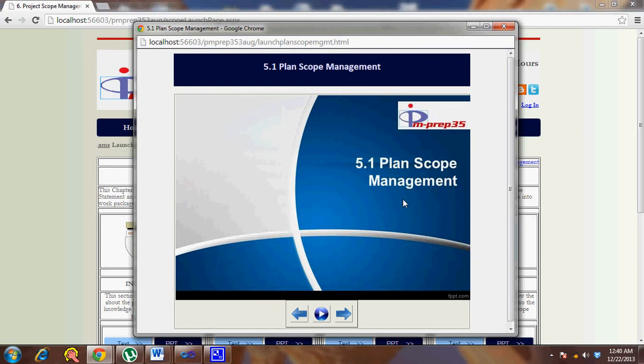That's where your project charter is really vital. Your project management plan will tell you how you will detail scope or the different subsidiary plans, but the project charter has more specific details about what is required, what the scope is, what the inclusions are and what the exclusions are, so that you can plan for it at a detailed level in the scope management plan.